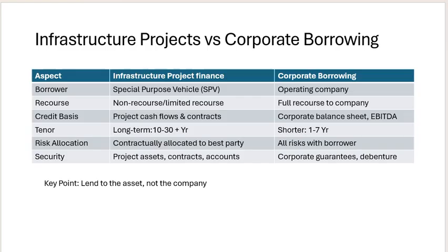You should do the stress testing, sensitivity analysis, scenario analysis, and gap testing to consider the different kinds of scenarios. In this case, what is the debt service if, suppose, the maintenance is delayed for 2 years, operation and maintenance cost increases by 10%, or the cost of the required raw material increases, or if there is any fraudulent activity by the sponsor or the sponsor's working members? We need to identify that.